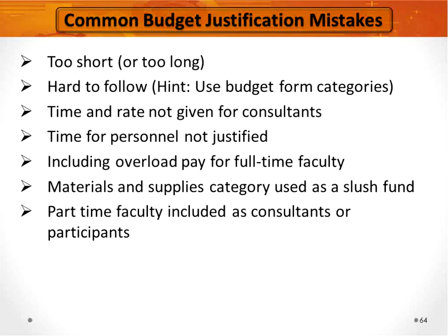You cannot ask for overload pay, and I know this at times can be a real problem for full-time faculty who make their full salary each year by teaching overload courses every single semester. But it's something that NSF just does not allow. That's one of those ones you have to think about carefully as you prepare your budget. Don't just stick in dollars because you think that you could figure out how to use extra dollars.